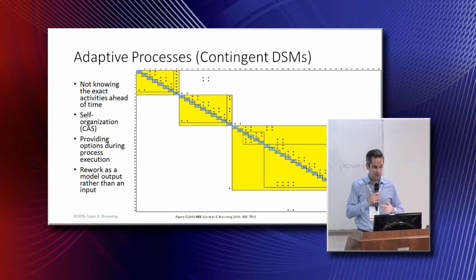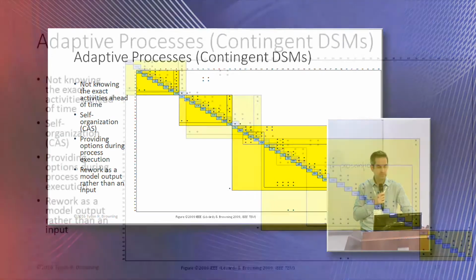So this particular model said, we're just going to give some simple rules that when you get to a position in the project, you decide which next path to take based on where things are in the project in terms of cost, duration, and technical performance. So accounting for all three of those. So it was really what we call a complex adaptive system, allowing the project to self-organize, allowing the process path to emerge rather than be prescribed in a plan ahead of time.